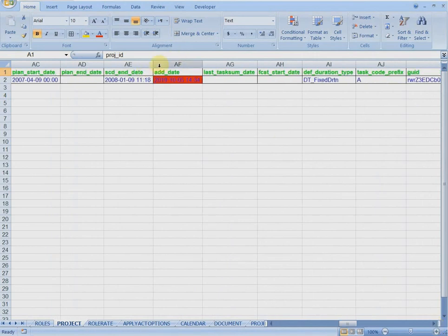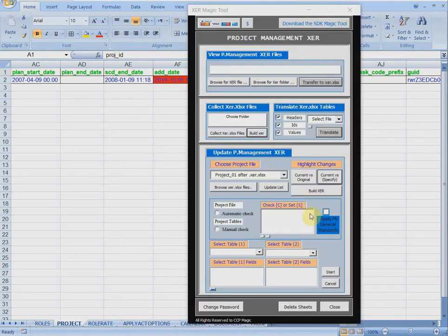and this is the value in the second file. As you see, this is add date, and it has no effect on the project. For your knowledge, sometimes it's very useful to compare the project file before you import it to Primavera with the same file after you export it from Primavera to get any changes during the import process.